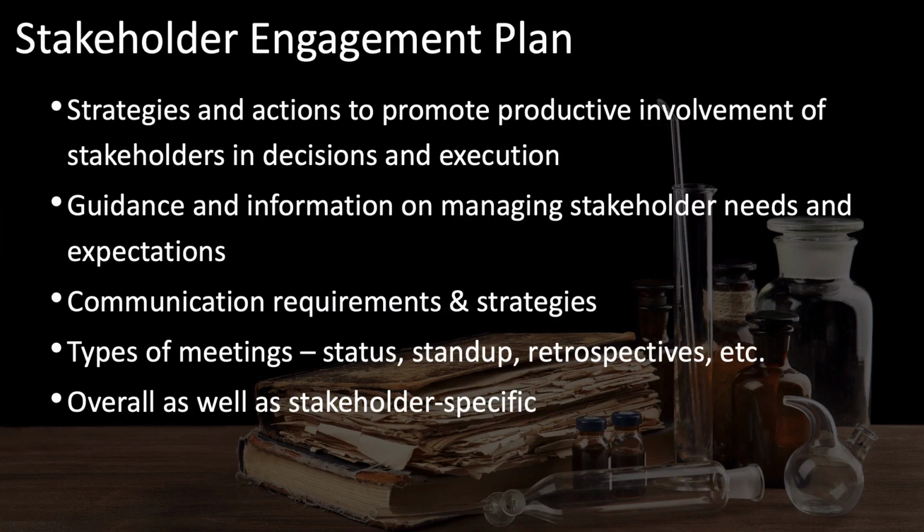It may also include the different types of meetings that you'll hold in order to engage people, including things like status meetings, stand-up meetings, and even retrospectives. This stakeholder engagement plan should provide some overall direction and guidance, as well as be stakeholder specific, especially when it comes to managing expectations and individual communication method preferences.